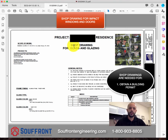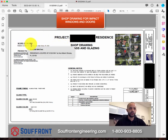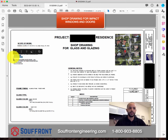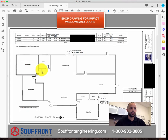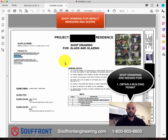Shop drawings are required when you are going to be obtaining a window or door permit in South Florida. It's required that the products you're going to be installing have an NOA or a Florida product approval number. We like to highlight the scope of work, the products we're going to be installing or designing for, and we label the NOA and the series. Moving down, we include the finish, the glass type, and general notes — this is our layout for our shop drawings.